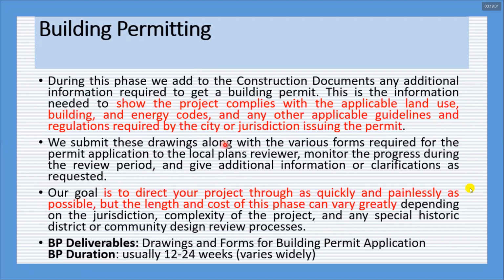These drawings are then forwarded to building authorities, just like the Lahore Development Authority (LDA), and they will issue you the permit. Most of the time, there are many projects in progress, so they have to review your drawings. It will take time. They will ask for further clarifications and information if anything is missing.